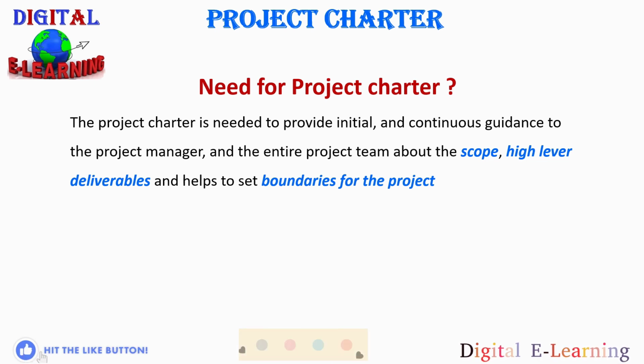And this charter formally authorizes the existence of a project. If there is no project charter, or the project charter is not signed off, then officially there is no project. You may be working on some ghost project. Be careful. The project charter also names the project manager and the authority on the project clearly. This enables the project manager to expend money, hire resources, or even get the functional manager to allocate resources to this project.